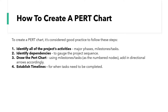So how do you create one? To begin with, you need to identify all of the project's activities — that could be major phases, milestones, and tasks. You need to consider and identify any dependencies, essentially enabling you to gauge the project sequence. Then you need to actually draw it: put down those milestones and tasks, think about the numbered nodes, and add in those directional arrows accordingly. Lastly, you need to establish your timelines for when the tasks need to be completed.